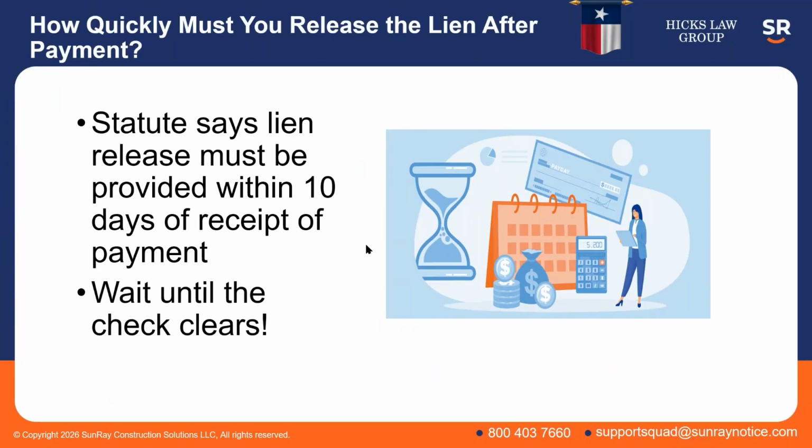But that 10 days. Now, if you don't comply with this 10-day deadline, is that really a super big deal in Texas? No. Folks go over 10 days all the time, and there's no penalty for it. The statute doesn't have any sort of penalty that if you fail to provide the release within 10 days, oh, you're in a lot of trouble and you have to pay a fine. There's no real penalty for not getting that done within the 10 days, but technically speaking, that's what the statute says. But I see folks going over this 10-day mark every day, and I've only seen it be an issue probably twice in 25 years of practice.